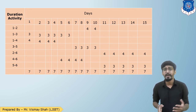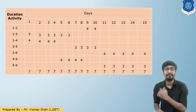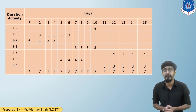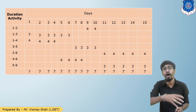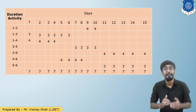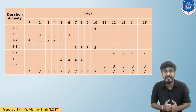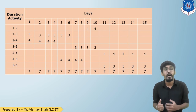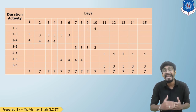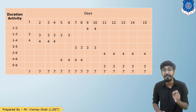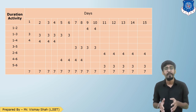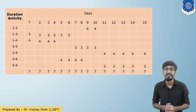As you can see, the peak requirement has now been balanced. We have not changed the project duration because it was not necessary. While doing resource leveling, it is not compulsory that the project will always get delayed — but if you are not leveling correctly and not managing the project well, the project may get delayed during the process. Keep that in mind. I hope we are clear about resource leveling.